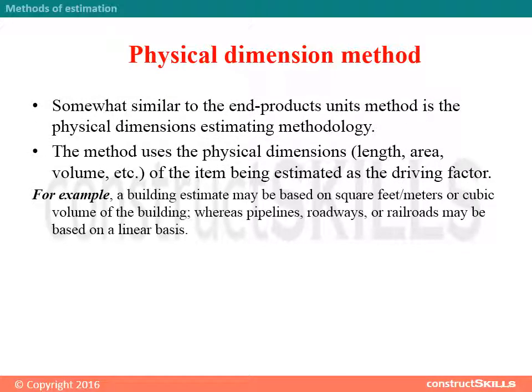Physical Dimension Method is somewhat similar to the end product units method. The method uses the physical dimensions — length, area, volume, etc. — of the item being estimated as the driving factor.